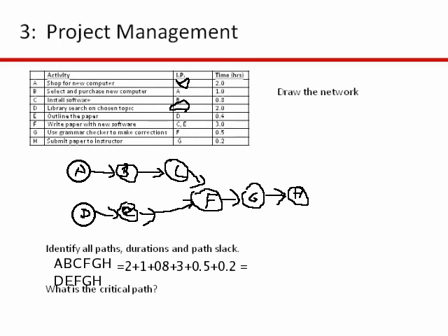And so if you add up all those times, let's see, you get 3, 3.8, 6.8, 7.5 hours for the first, that northern path, A, B, C, F, G, H.